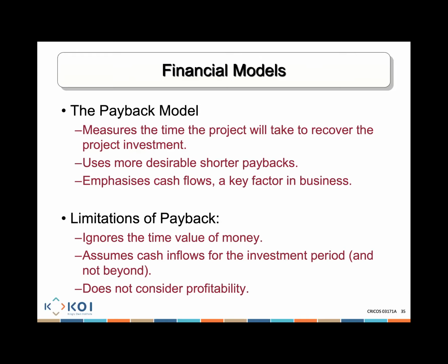Why? Because $1 today is worth $1. $1 in 5 years' time is worth less than $1 because money does lose value with time. So the payback method is one approach, but it doesn't look at the value of cash flow at any point of time. It basically assumes cash inflow for the investment period.